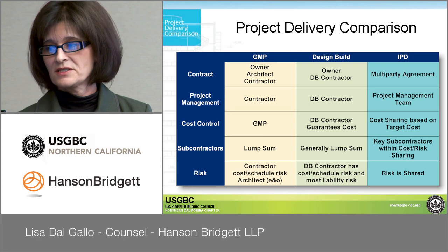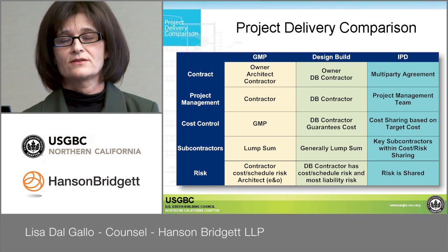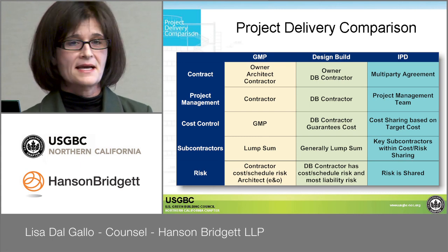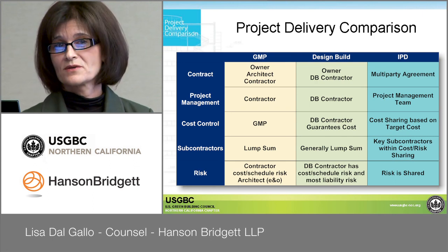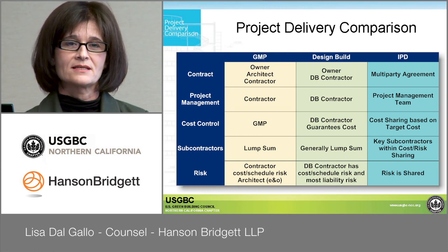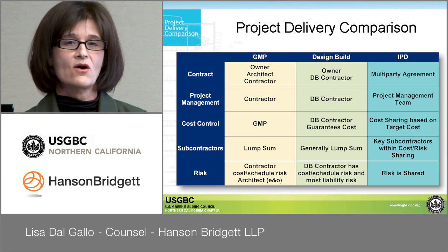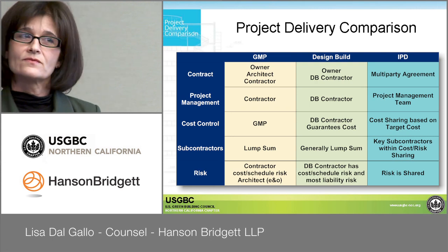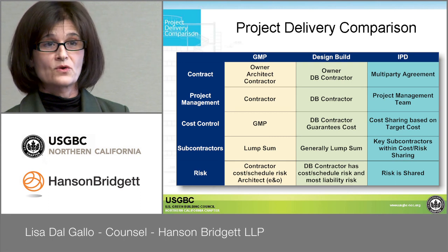IPD, you have a multi-party agreement, as Howard and Annette have discussed. You've got the architect and the contractor executing one agreement with the owner. Here you have project team management, as everybody's discussed so far, and it's a one-to-one-to-one relationship. So you've eliminated the finger pointing because the owner, the architect, and the contractor are all managing the project jointly, and they all have the same rights and are allowed to opine however they feel. They're collaborating as a team, and their risk is shared.